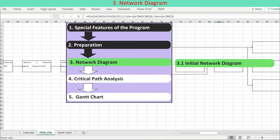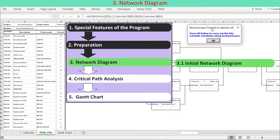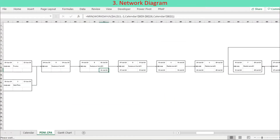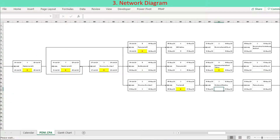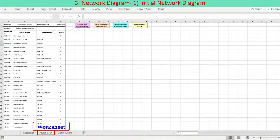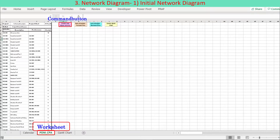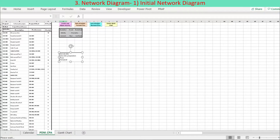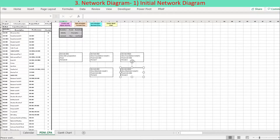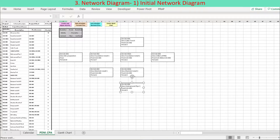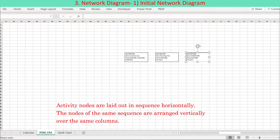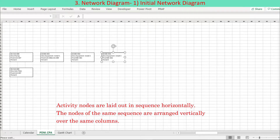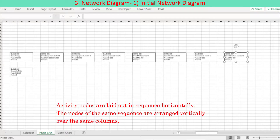The initial network diagram is drawn automatically as a representation of the schedule data table. The network diagram is reviewed and updated to suit your demand, and this network diagram will be the basis of your critical path analysis. To create a representative network diagram, press the left pink button at the top of the worksheet named PDMCPA. The first diagram generated is just a pictorial representation to review the precedence of activities. Activity nodes are laid out in sequence horizontally from left to right on the worksheet, with nodes of the same sequence arranged vertically over the same columns.